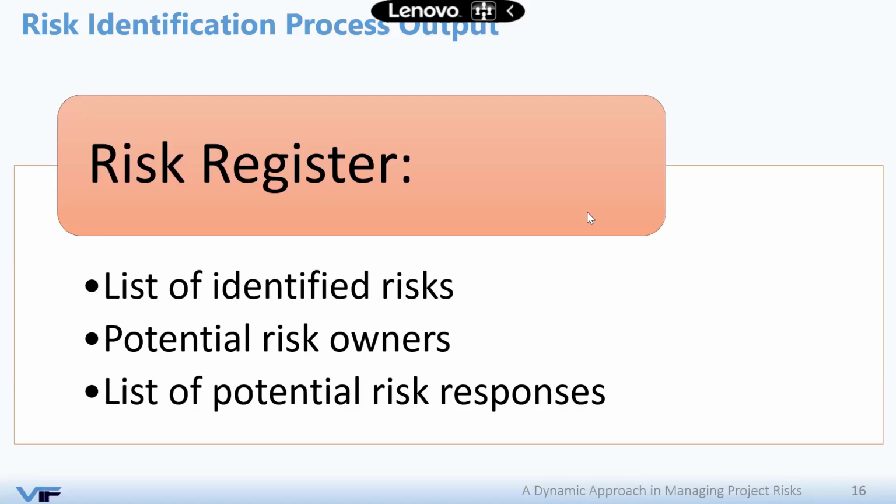From the minute you accept the project charter that authorizes you to start the project, you need to start thinking of risk identification. And this step will continue with you until the end of the project. Every time the scope changes, every time something changes, lots of, for example, scope changes or requests from stakeholders happen on the project, you need to stop with the team and start another round of risk identification. And once you identify the risk, again, you need to assess them either quantitatively or qualitatively.